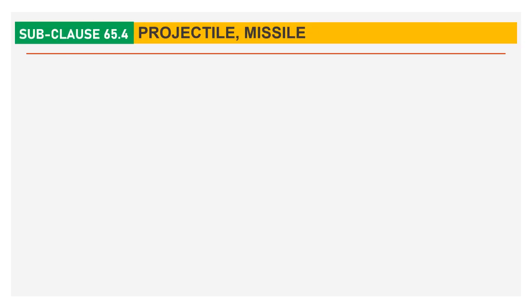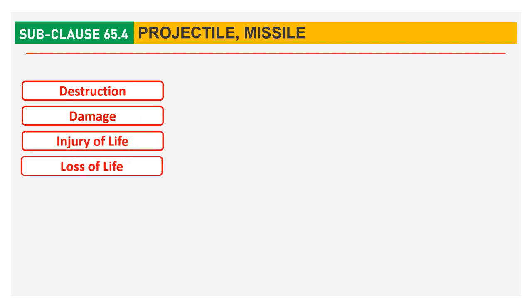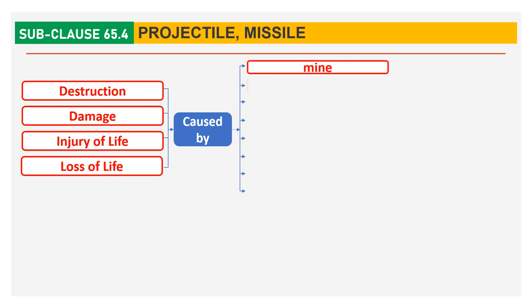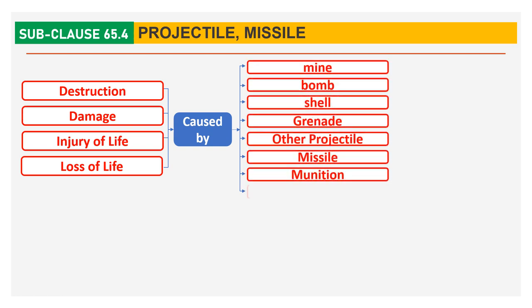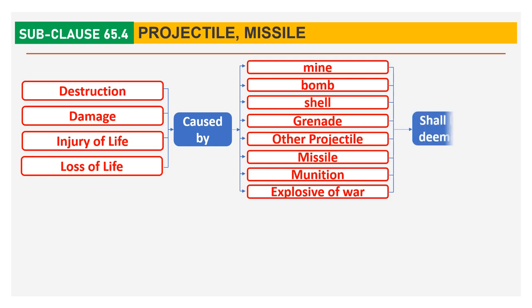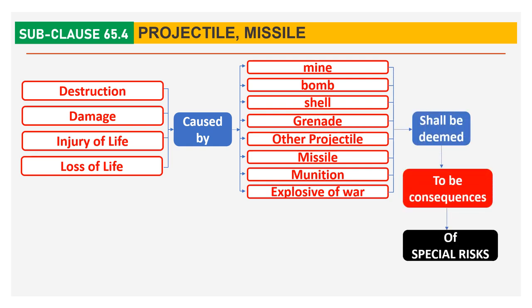Sub-clause 65.4 Projectile and Missile: if destruction, damage, injury or loss of life is caused by a mine, bomb, shell, granite, missile, munition or explosive of war, these shall be deemed to be consequences of Special Risk.